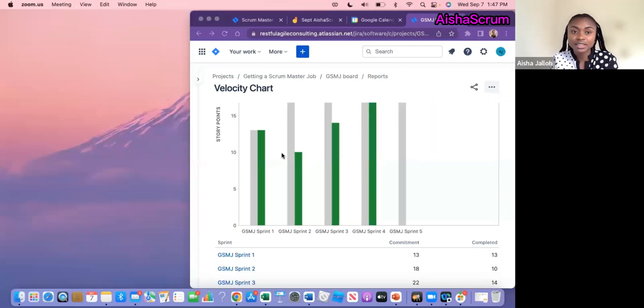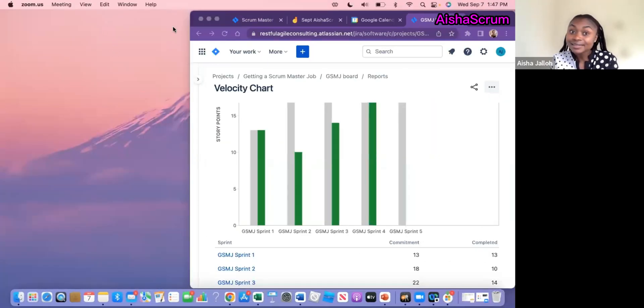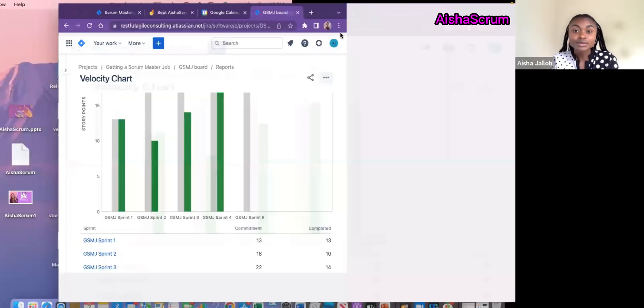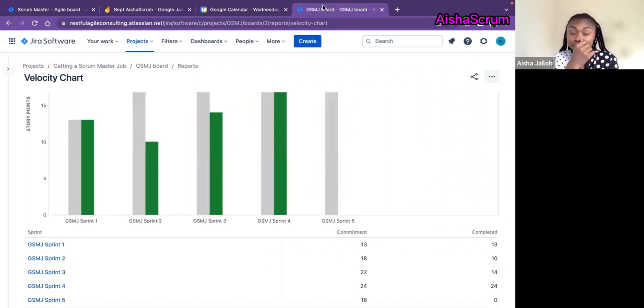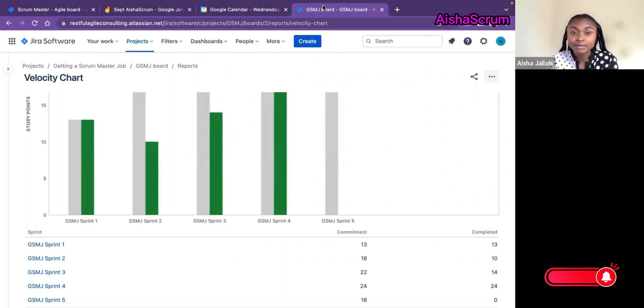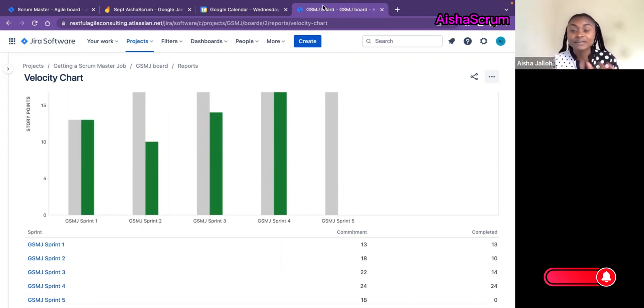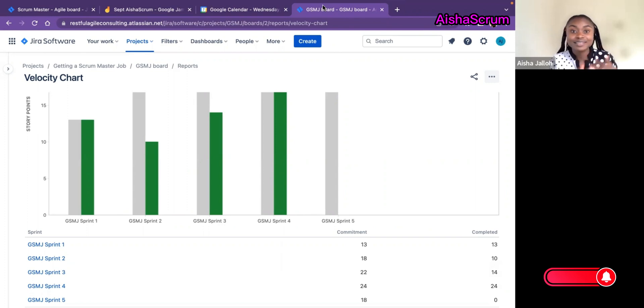Velocity is very important. It's a metric we use in Agile and Scrum teams to predict how many stories we can commit to in a given sprint. It is also commonly used for release planning to predict how many sprints we need to complete to be able to deliver this value.